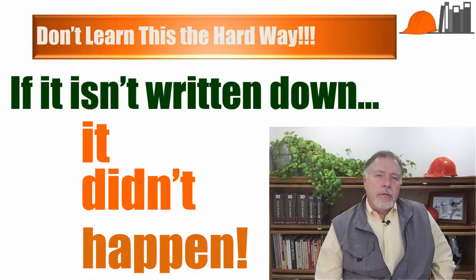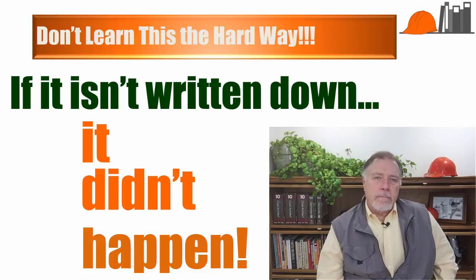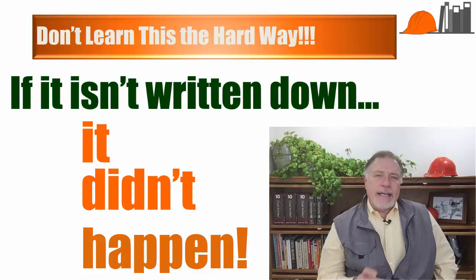And even if you are able to recite facts of the incident perfectly, it really won't matter. As evidence, a document written at the same time as the occurrence has much more weight than verbal testimony. You'll use each of these 5 forms to document what is happening on the project as it is happening.